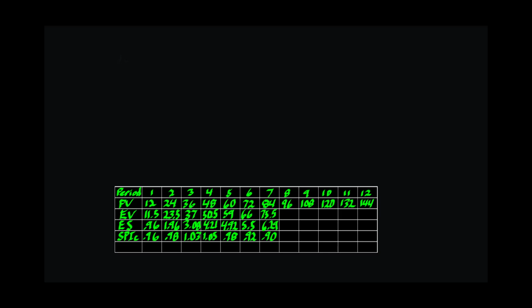To do that, we first have to choose the best formula for the estimate. Look at the values of the SPIt, the Schedule Performance Index for time. Is there some separation between the values and the nominal value of 1.0? Yes. Is the divergence in values across periods not large? Again, yes. Therefore, use the classic formula for the EACt. That is, the plan duration divided by the Schedule Performance Index for time.